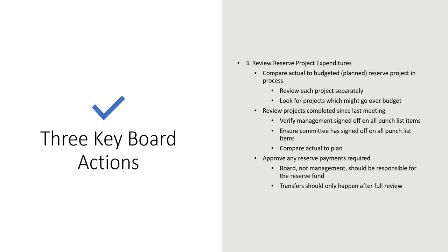Any projects that were completed, before you sign off and you put that thing to bed, make sure all the punch list items are signed off on. Again, you don't want anything hanging out there, because if somebody noticed what looks like a defect and it doesn't get corrected, you run the risk that that defect causes bigger problems down the road. So make sure everyone's signed off on it.